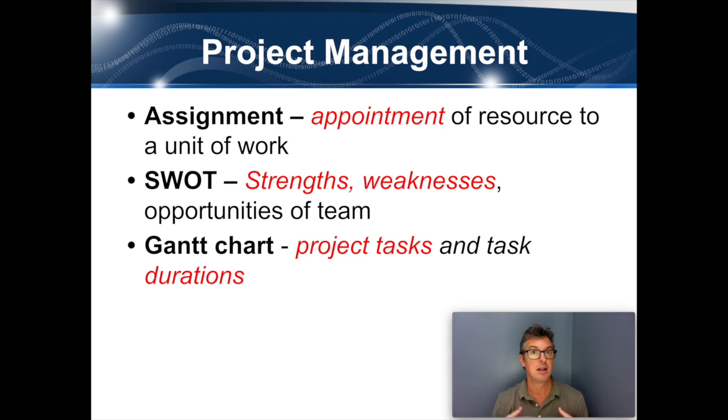And when there's a live Gantt chart, it shows people who get done early, that maybe start a certain unit of work. That whole team will transfer over and start another unit of work early. Or there's people who are late and how they have to reorganize what they were supposed to start next. They may give it to another team who got done early, right? That's the big part of project management. Mind-boggling.